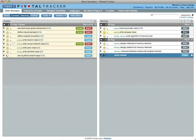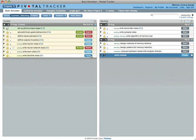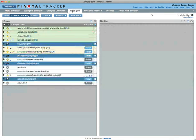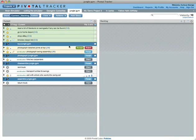Most stories are features as they provide customer visible business value. The rest are bugs or chores. Chores don't need to be delivered or accepted after they are finished. And neither chores nor bugs are worth any points, although that can be enabled. Releases are also treated as a type of story, so remember to click finish when you release.